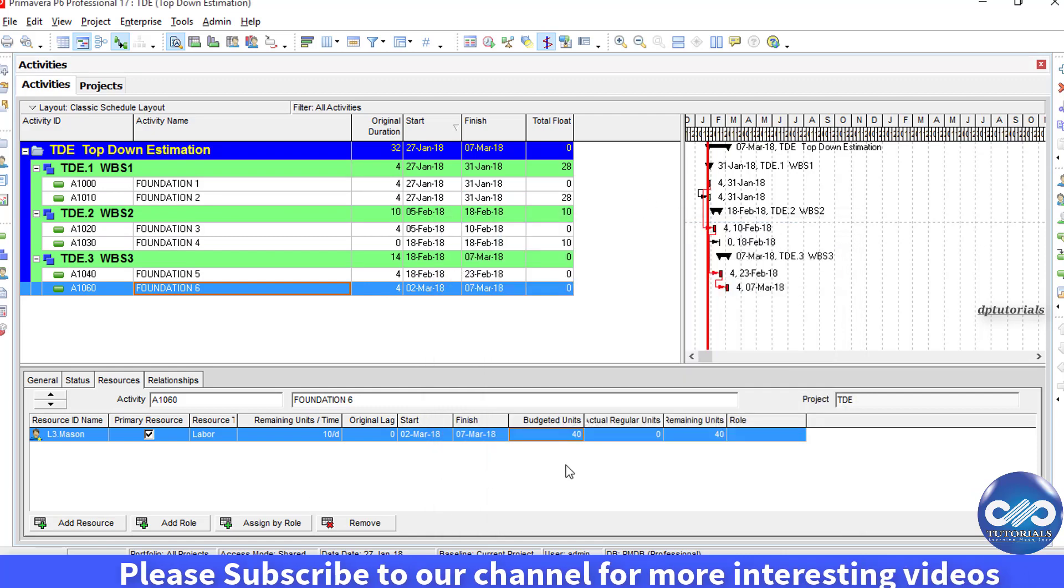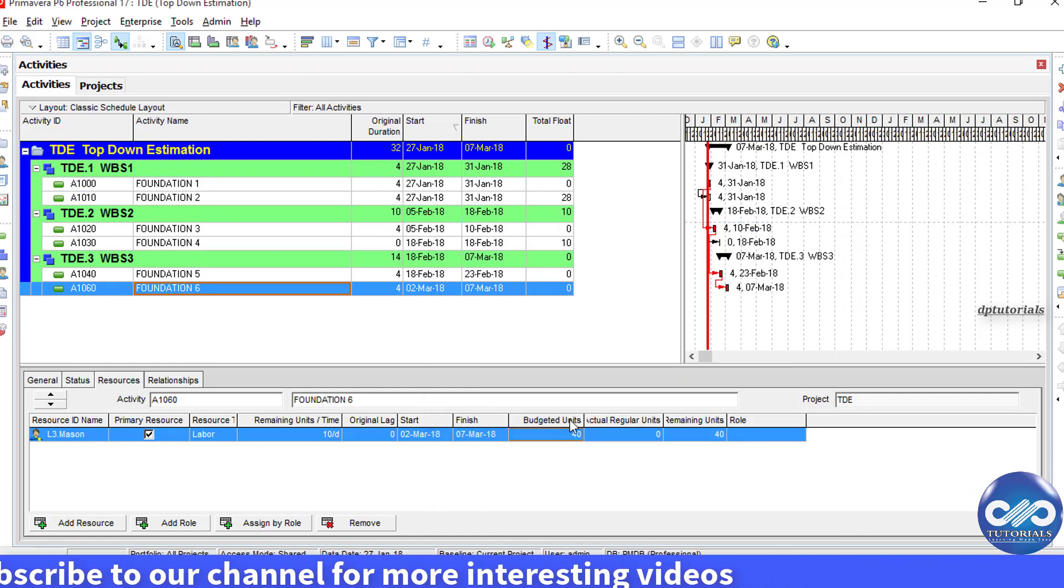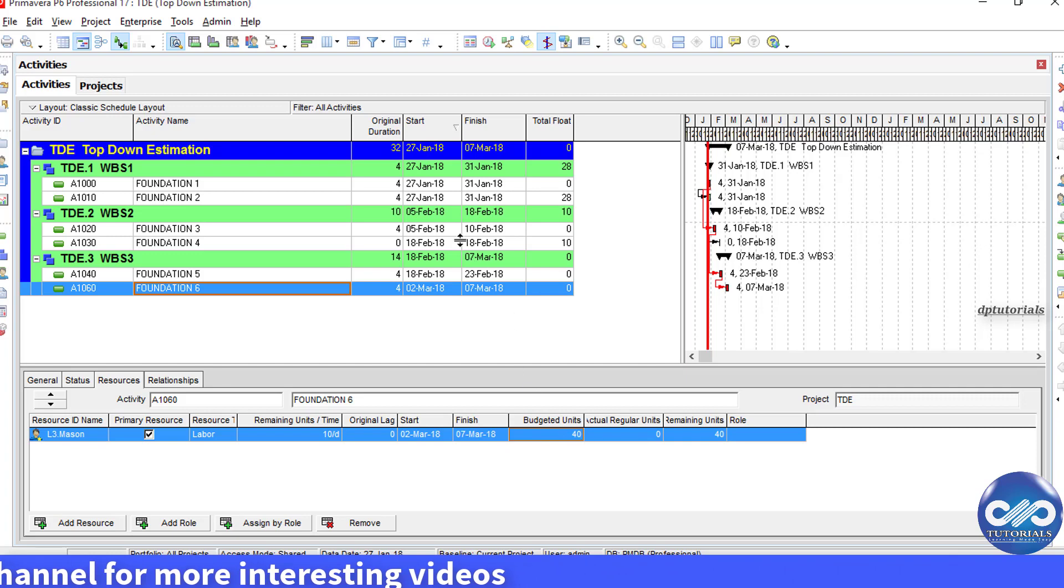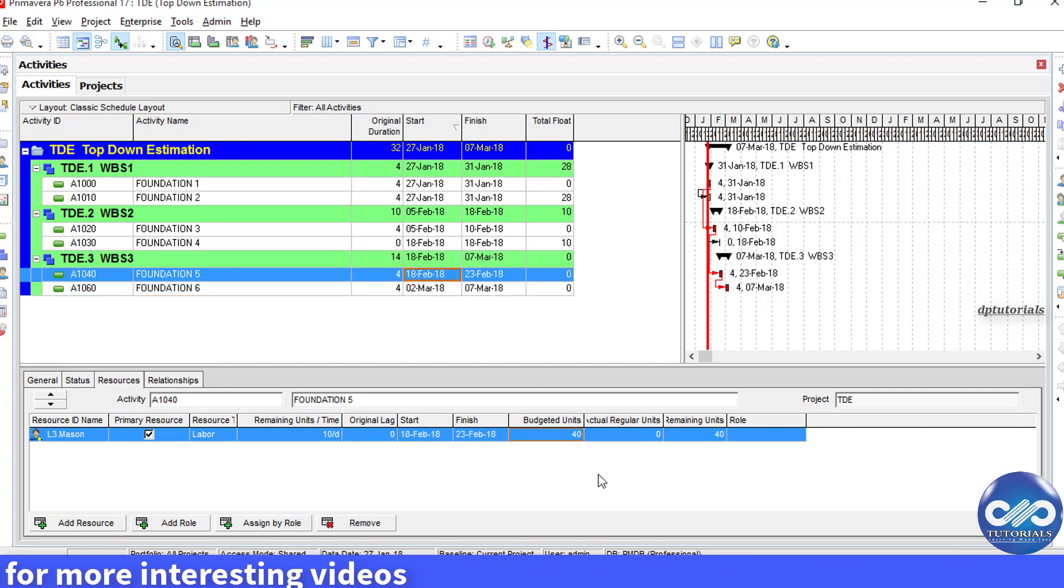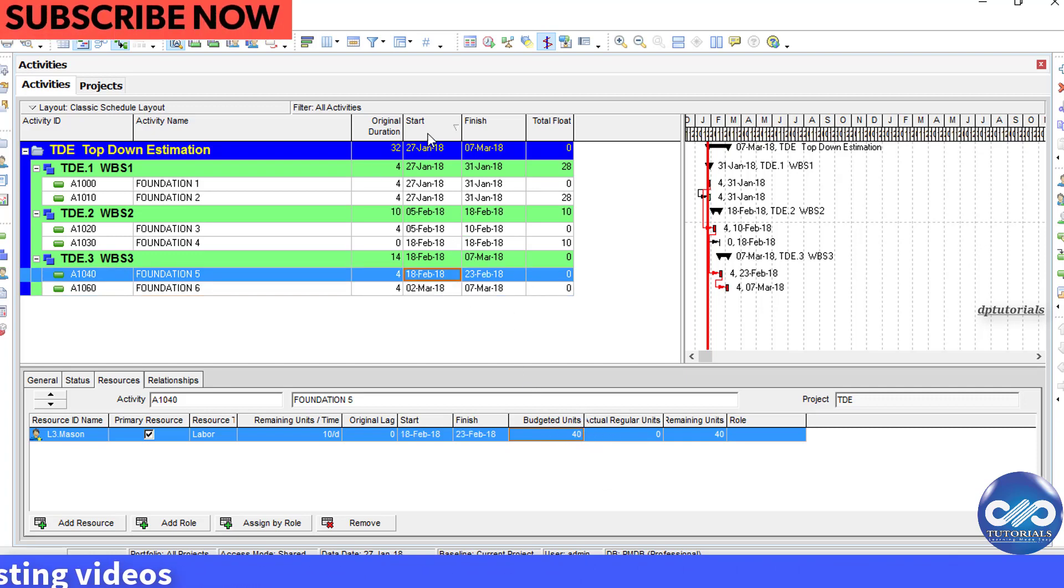By default, each activity will have 40 units because we have given the equal duration, that is 4.